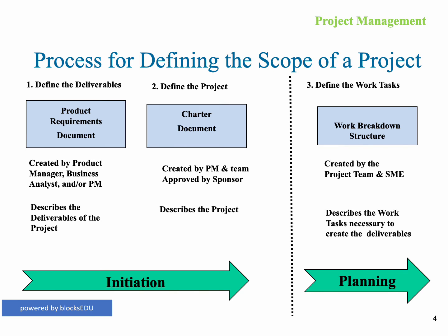The process for defining the scope of the project, or things that need to be done in the project, basically there are two major components that need to be done. And that is, one, we need to understand what the product is that we're actually commissioned to create. And that's usually done by a product manager or some business analyst or some other group, as often the requirements are done from that group or given off to the project team to then carry forward. But it is the responsibility of the project manager and the project team to verify that the project requirements are not fuzzy requirements, that there's something that actually can be achieved and something that we can measure to ensure that we've actually achieved those.